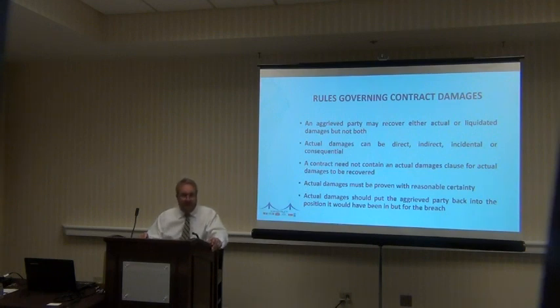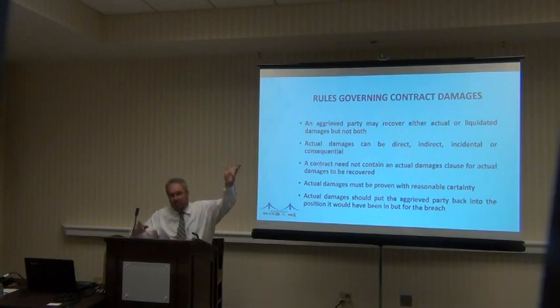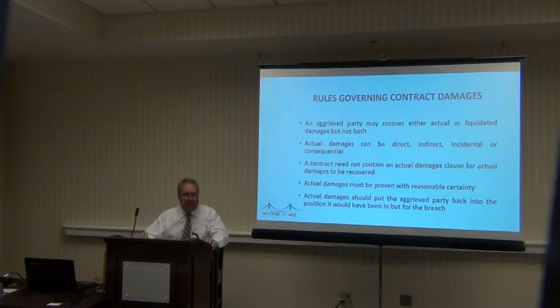An indirect damage might be, as a result of that fire, there's a whole bunch of smoke in the mechanical room. And maybe the heat got so bad that some of the water piping, or whatever, I'm just making stuff up, was damaged and the water piping will have to be replaced, or just the soot and the damage exposure that would result naturally from the smoke of the fire. Indirect damage. Incidental and consequential, kind of a fine line between the two. But as a result of this fire, they had to shut down the plant for 2 weeks, and they lost revenue of $100,000 per day because they couldn't operate the plant. That's an incidental, or probably more in that specific instance, consequential damages.